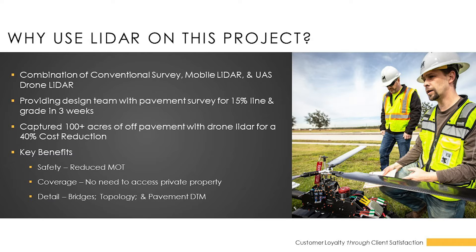We used a combination of conventional survey, static LiDAR, mobile LiDAR, and drone LiDAR on this project. A major push was that a 15% lighting grade submittal was needed very early, so the design team requested a digital terrain model of all hard surface pavement within the first three to four weeks. Utilizing these approaches, we were able to meet that challenging schedule.